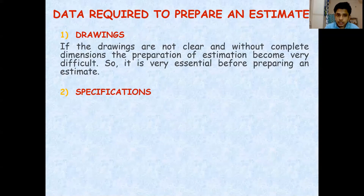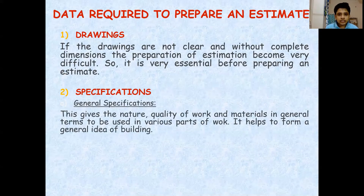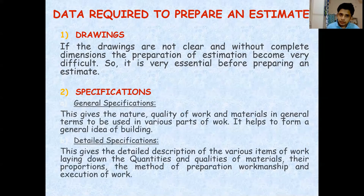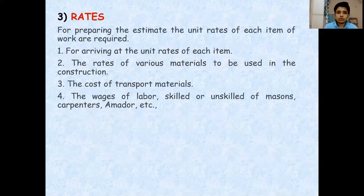The next data required is the specification. Specification means the quality or type of material that will be used. There are two types: general specification, which gives an idea about the entire work, and detailed specification, which goes item by item — various items of work, their quantities and qualities are mentioned. For example, specifying first class brick in a particular element, or specifying the grade of concrete and type of reinforcement in a beam.